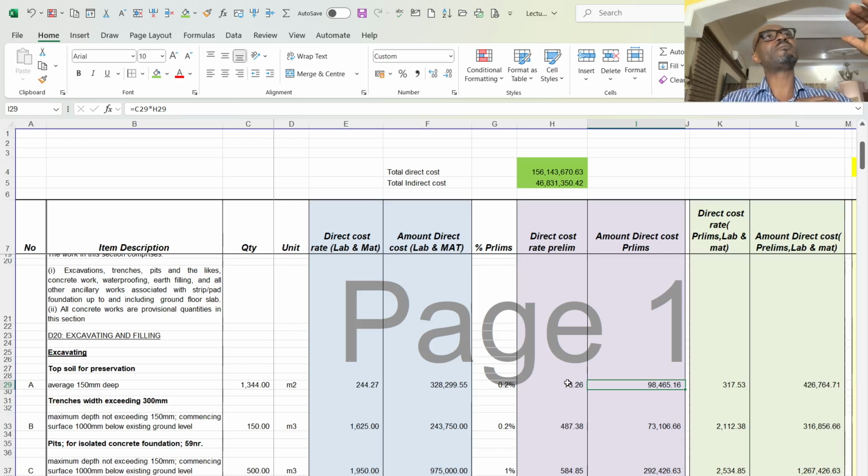Say maybe the foundation: you will load the initial cost and part of the recurrent cost in the foundation, so that by the time you finish the foundation and the client says it does not want to continue, you'll be in a better position than the client, because you made more money than what you were supposed to get.